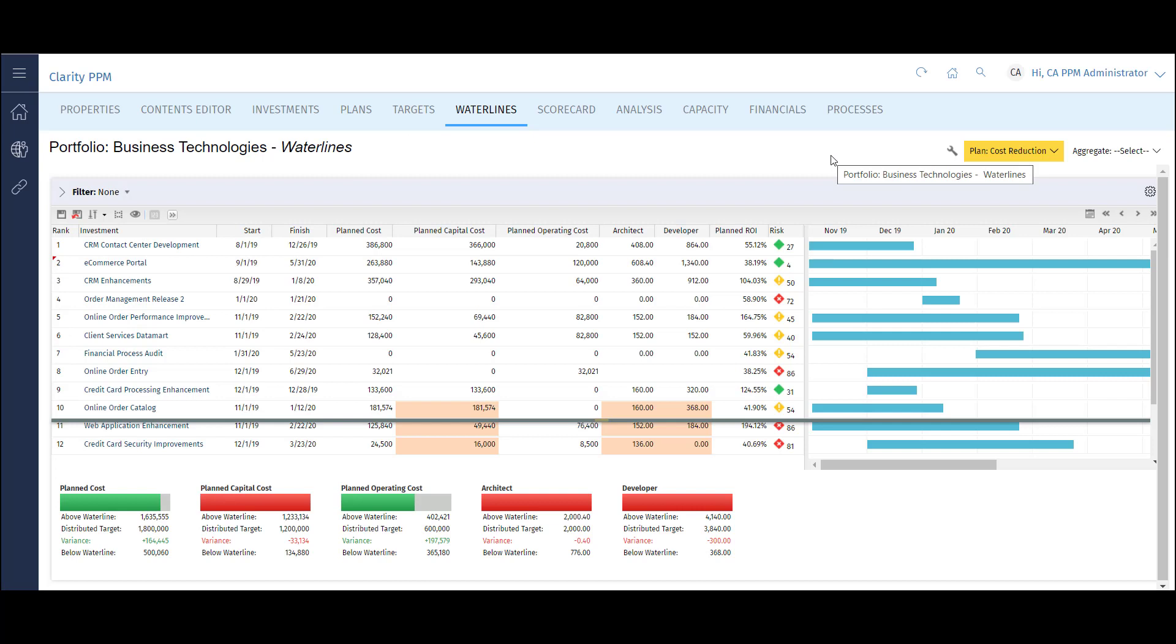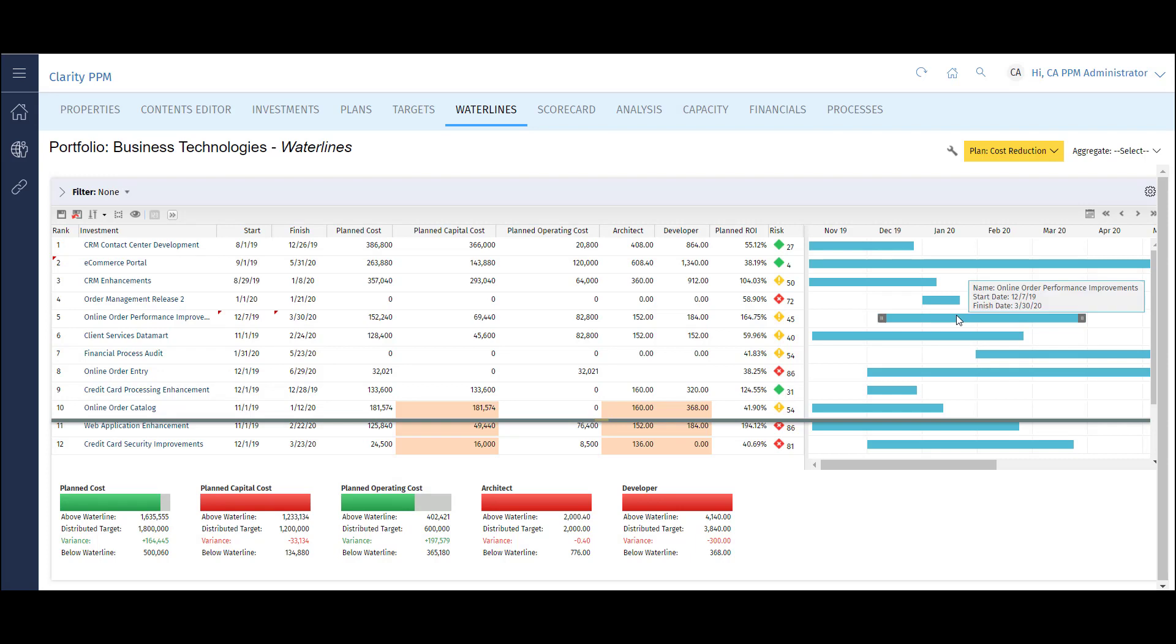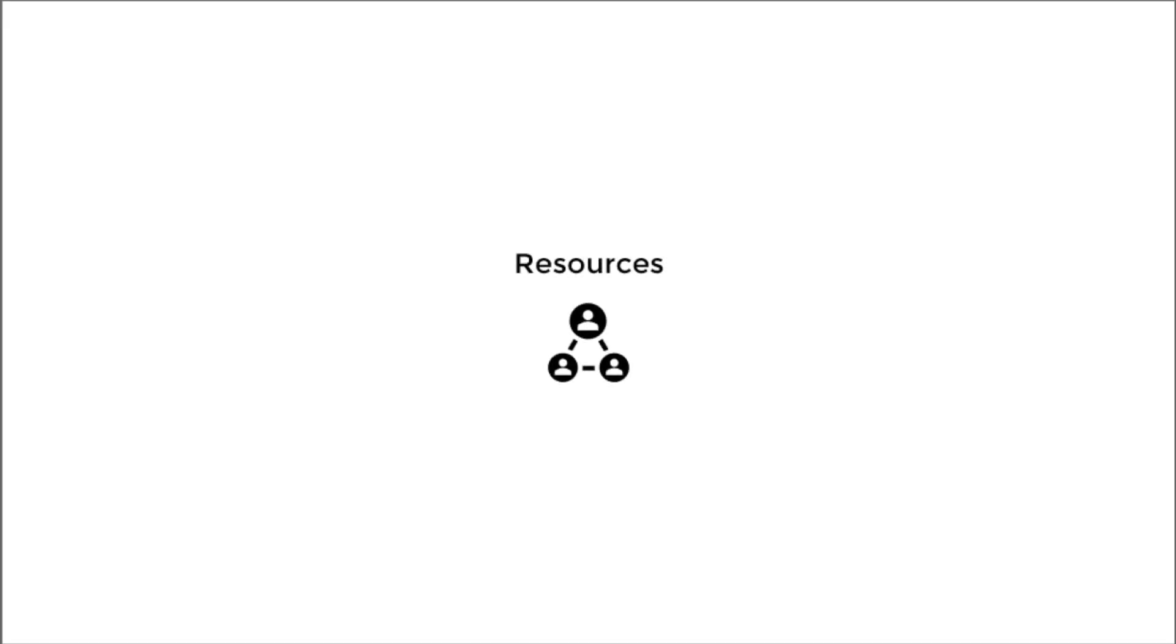Clarity portfolios have scenario planning with what-if analysis that allows users to model different situations and plan accordingly. In my modeling stage, I can use real-time data from my projects without impacting the projects themselves. I can push out a project schedule to see how that impacts the time constraints. I can plan for an increase in resource capacity or reduction in cost. Now that we've identified resource constraints, let's dig deeper into managing resource allocations throughout the organization.